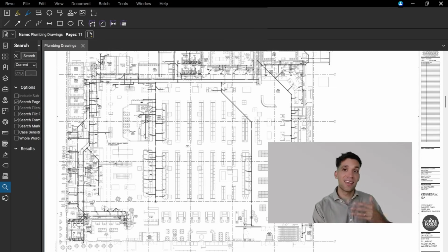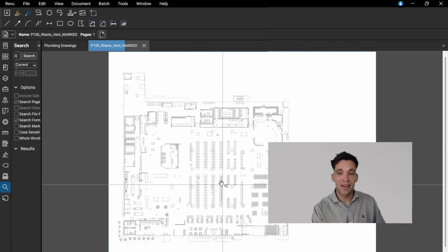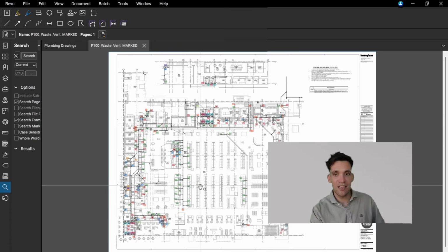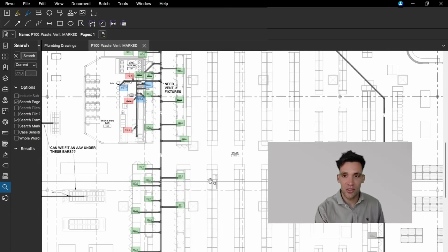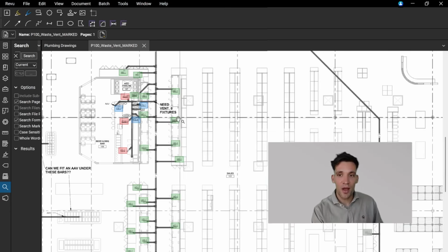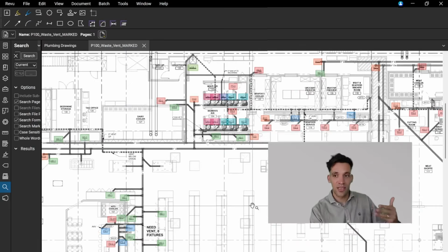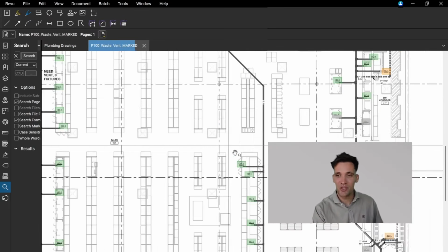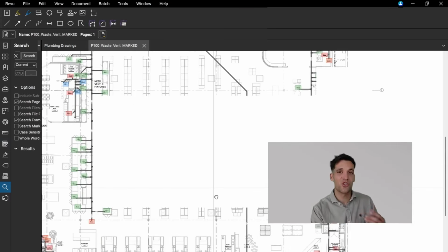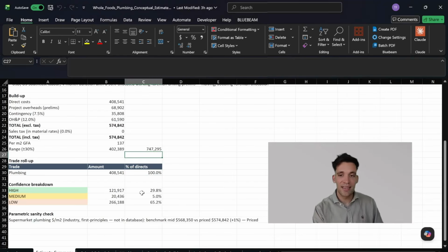The exception that I have found very recently is that if you are extracting the text layer from the construction drawings, and I built this into a quantity takeoff skill, you can actually count all the individual text callouts very accurately, but more area and linear measurements off a scale are just not as accurate at the moment.